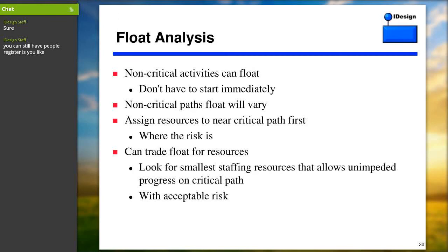And that means if you don't have to start them immediately, you have to ask yourself a simple question: why should I strive to start them immediately? If you start them immediately, you would need a higher degree of resources. So you can actually use the degree of float of activities as the key for assigning resources.